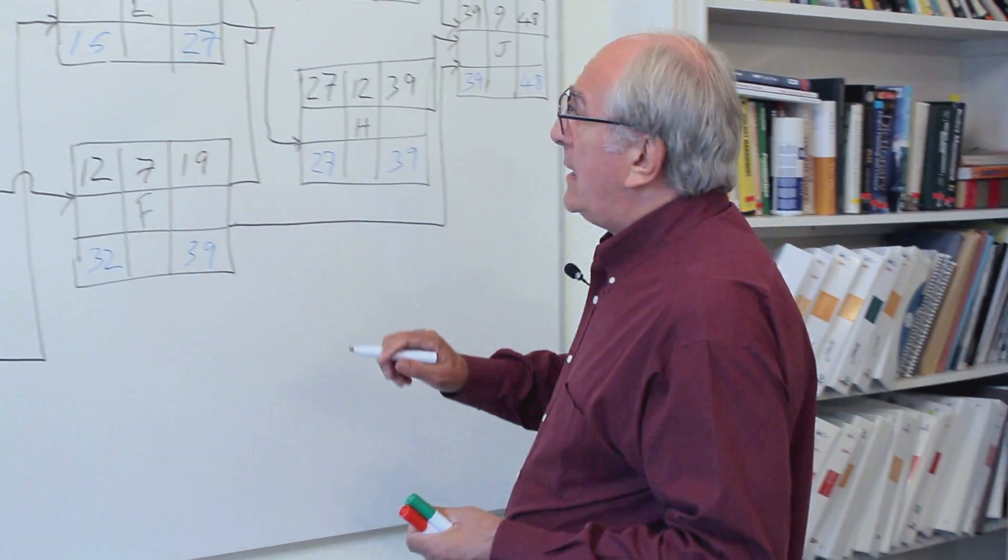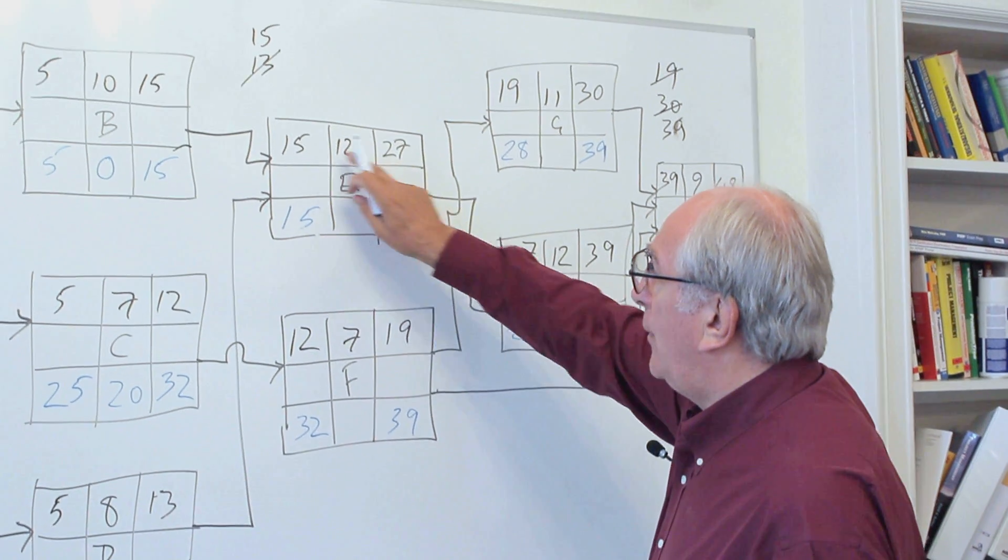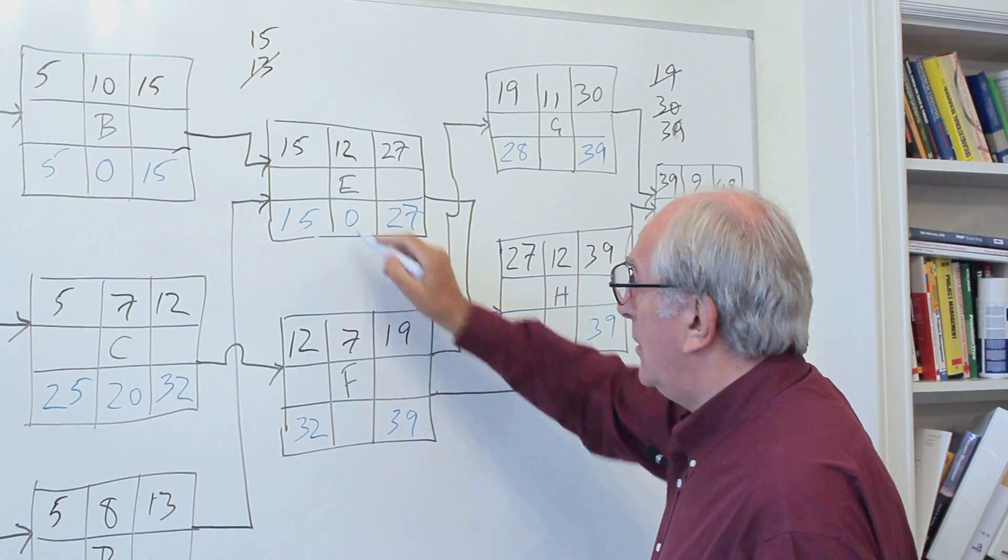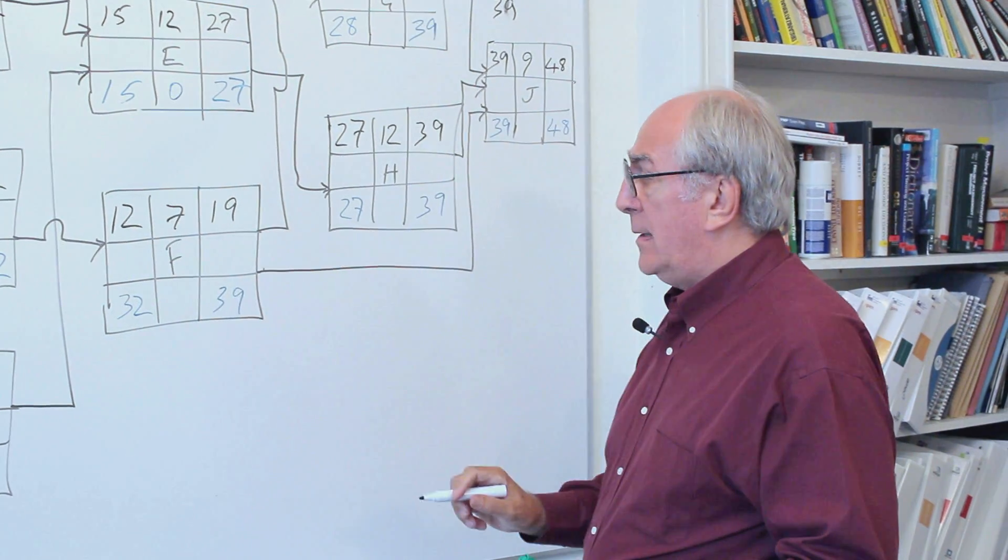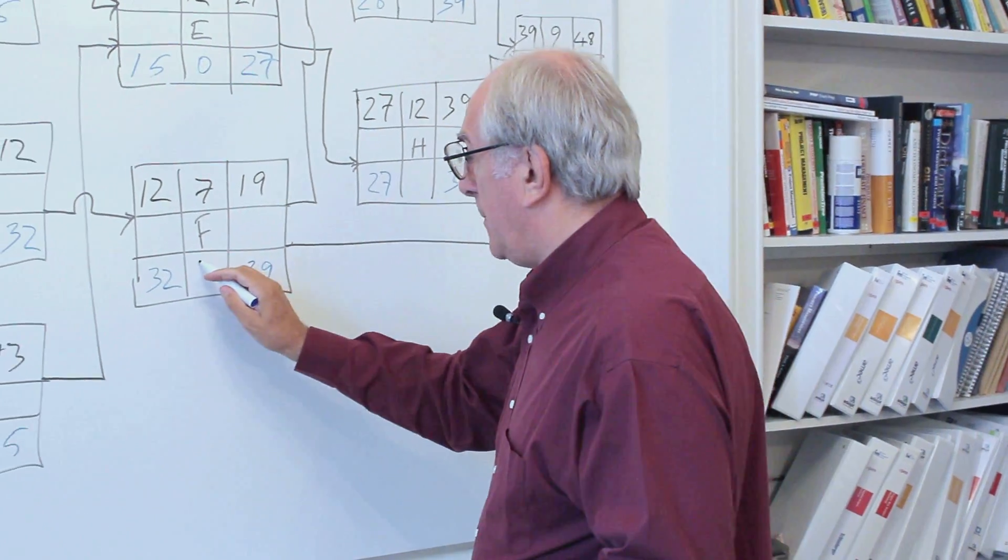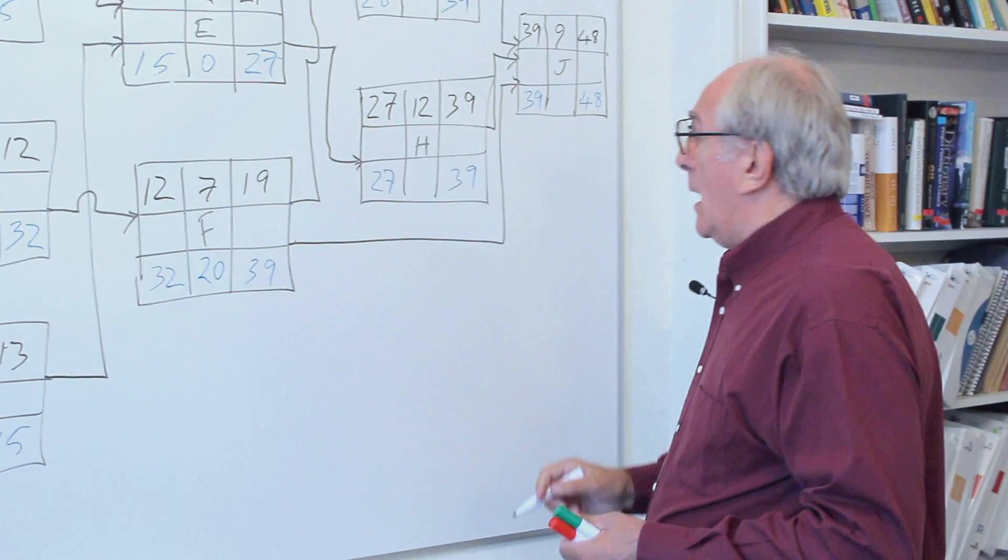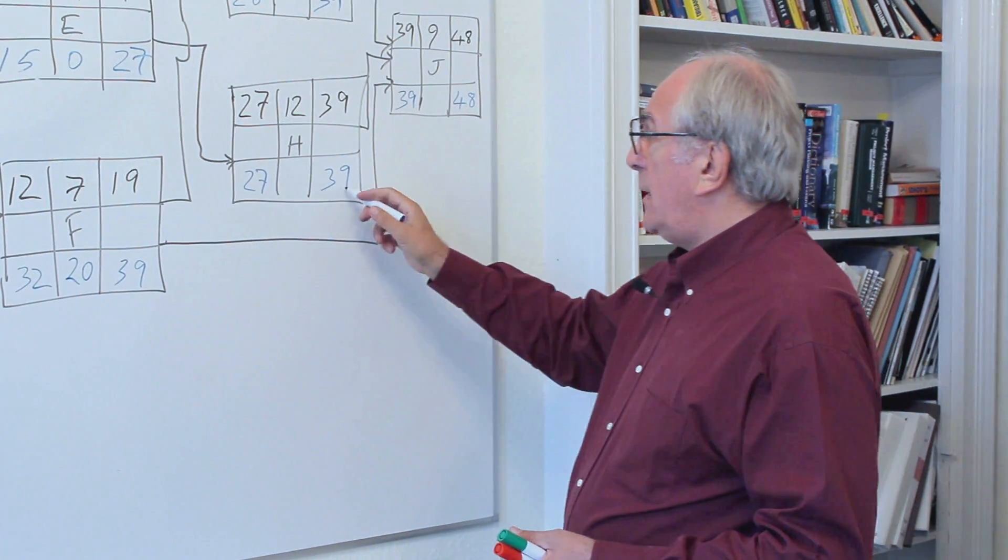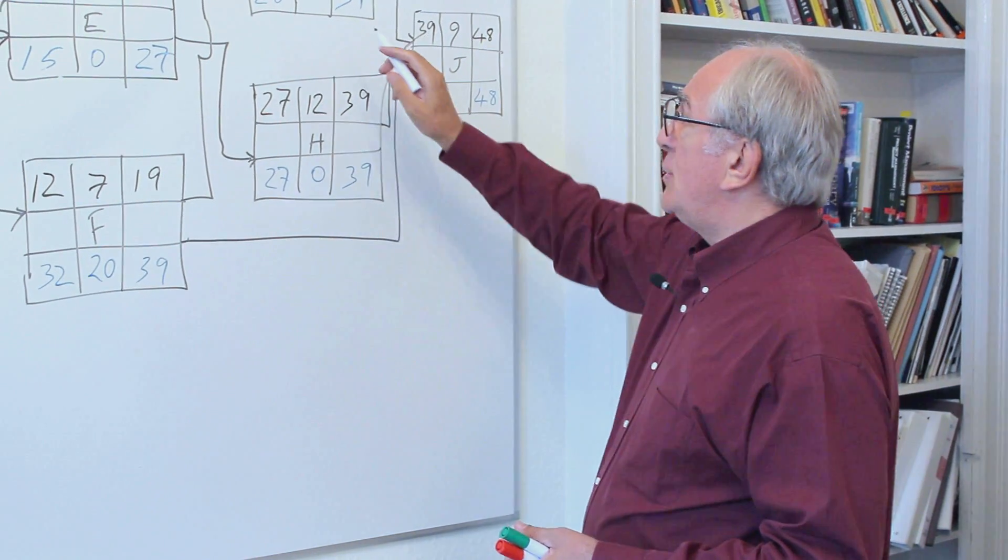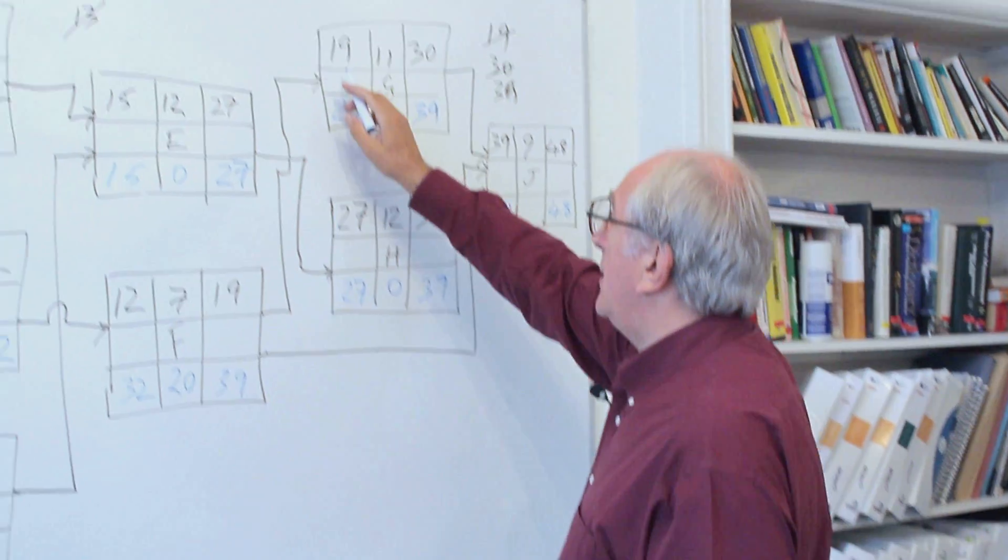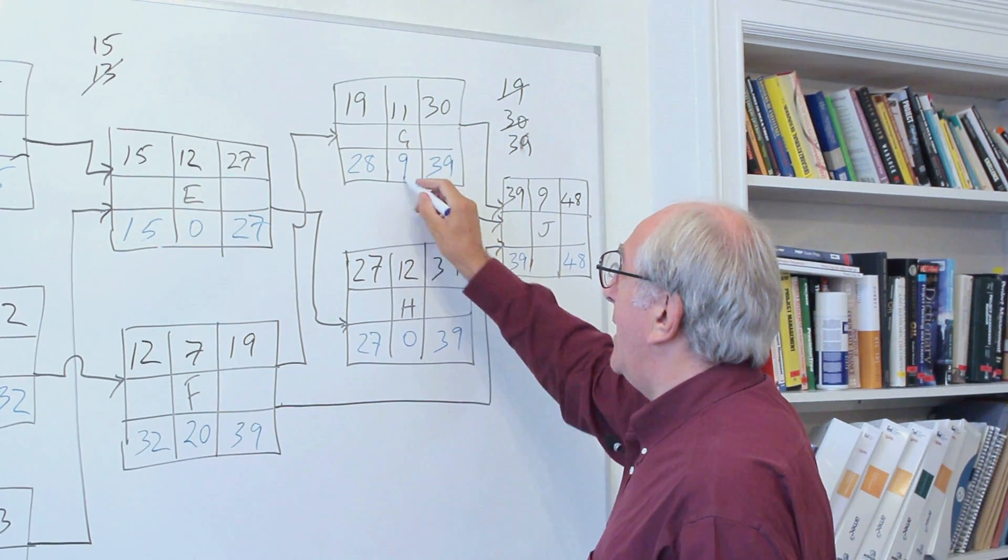Looking at activity E, you've got twenty-seven minus fifteen minus twelve, which is zero. And for activity F, it's thirty-nine minus twelve minus seven, which is going to give us twenty. Activity H is thirty-nine minus twenty-seven minus twelve equals zero. And G is thirty-nine minus nineteen minus eleven, which is going to give us nine.